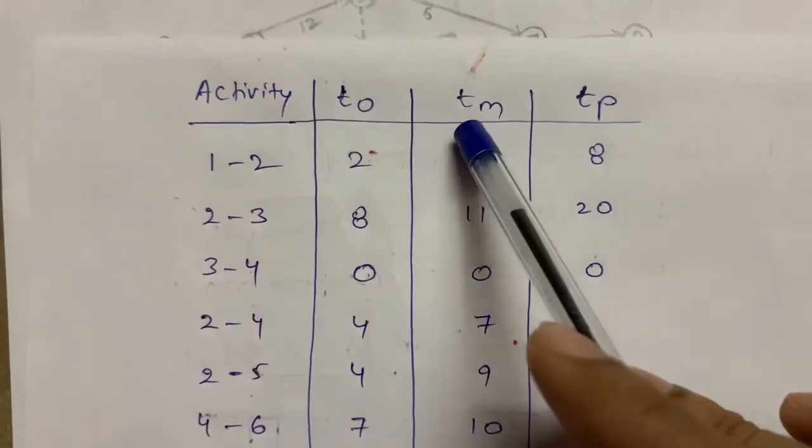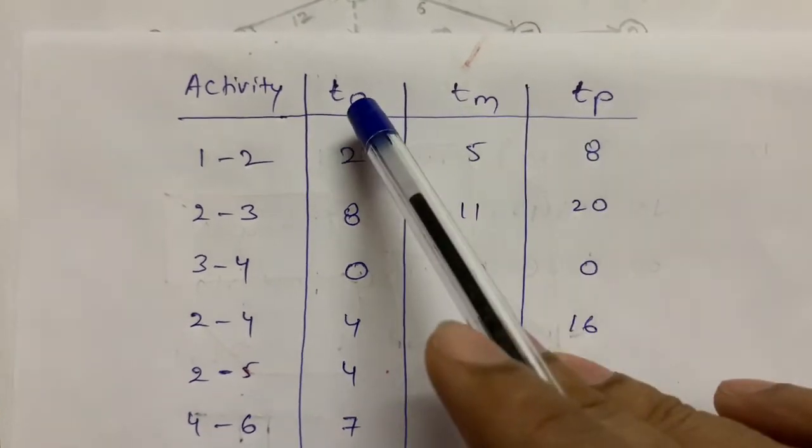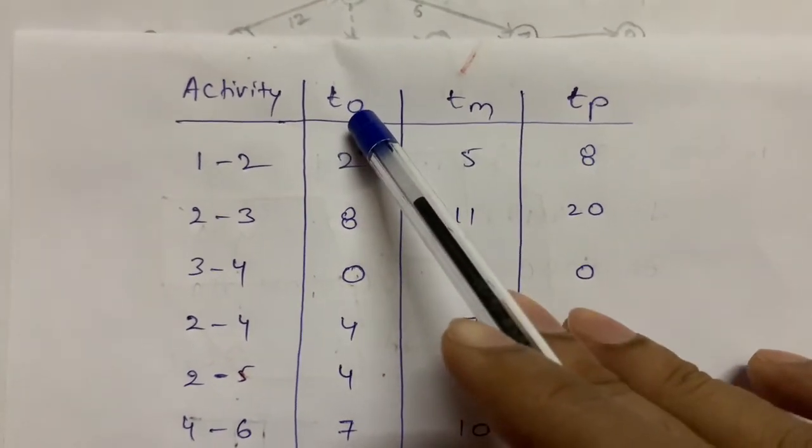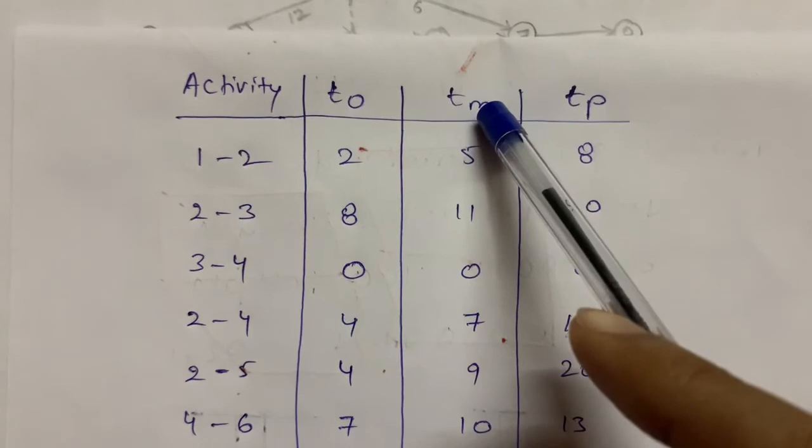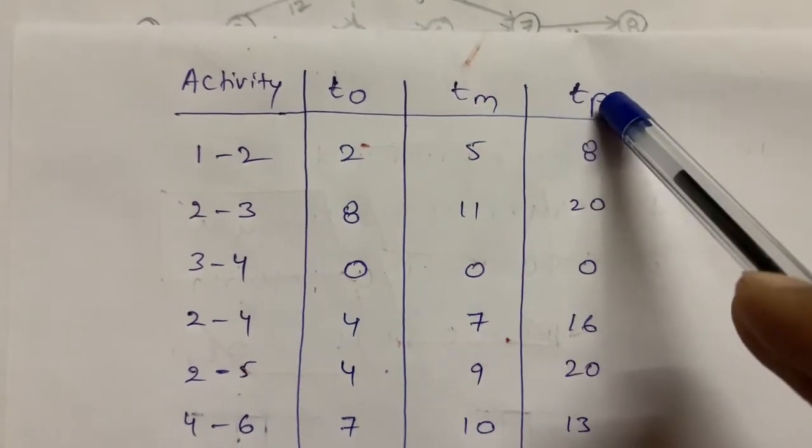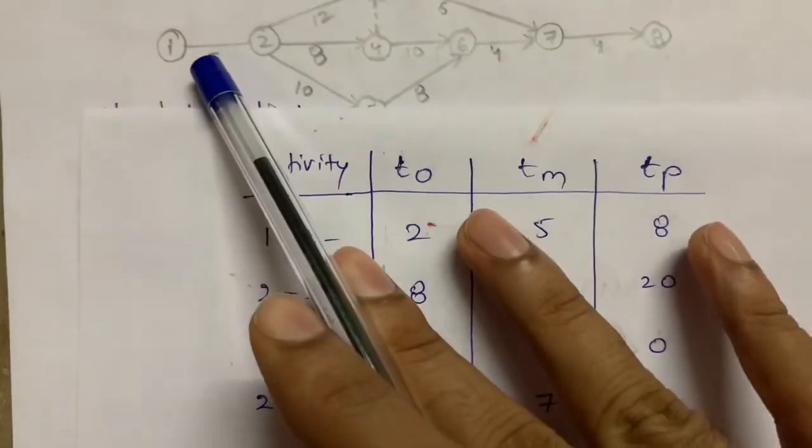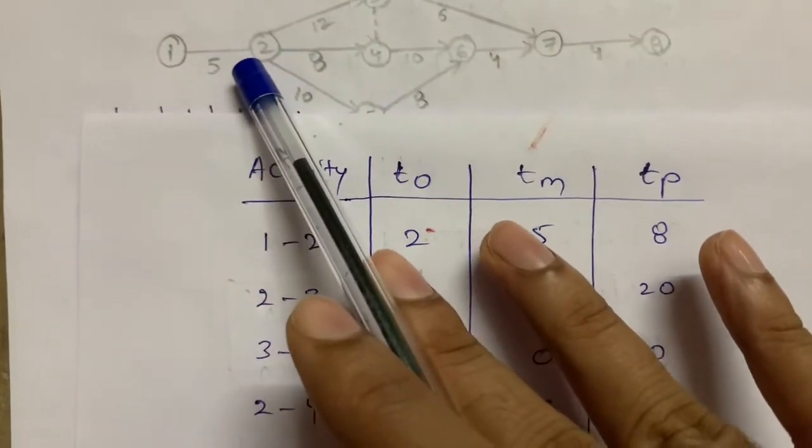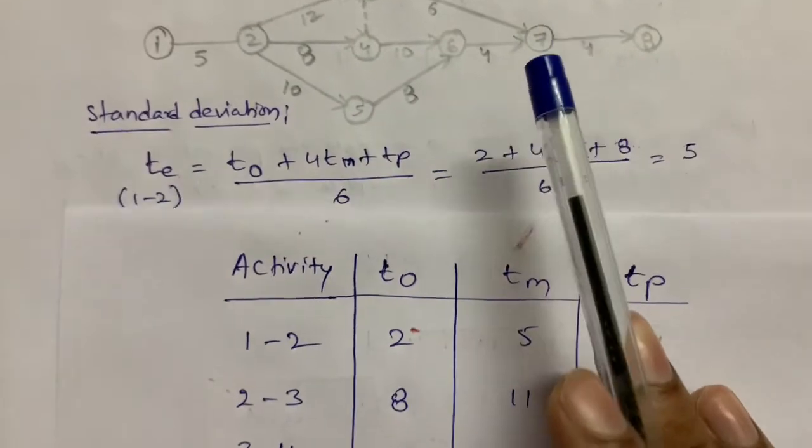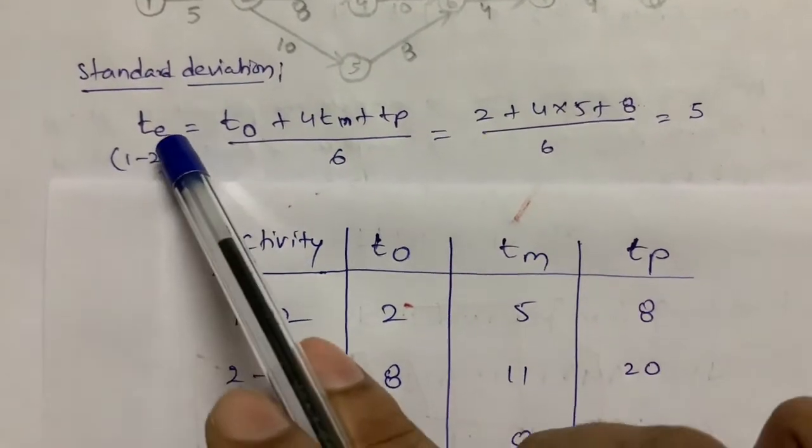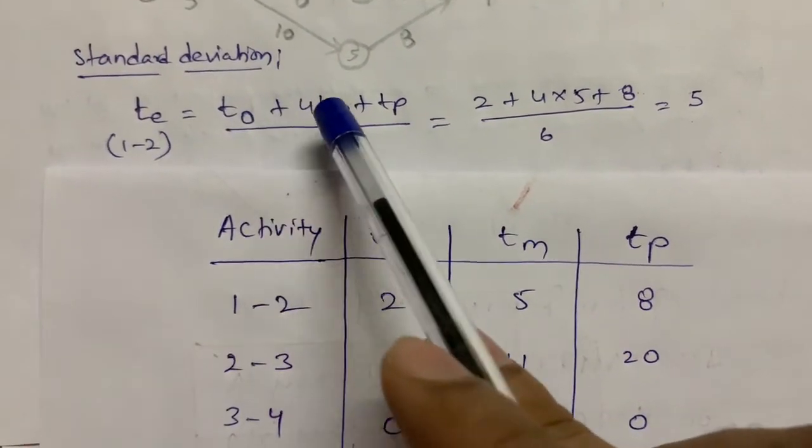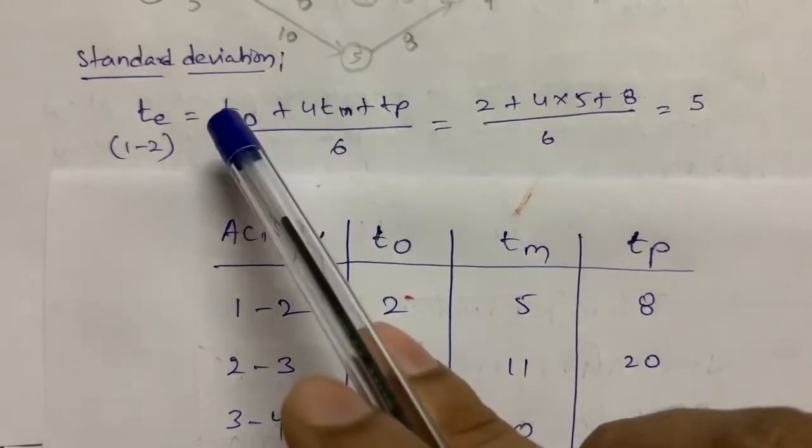That is TO, TM and TP. TO is nothing but optimistic time. TM is nothing but most likely time. And TP is nothing but pessimistic time. We need to find out for this activity, how many hours or how many days we need to complete this activity. For that, expected time formula is T equal to TO plus 4 TM plus TP by 6.